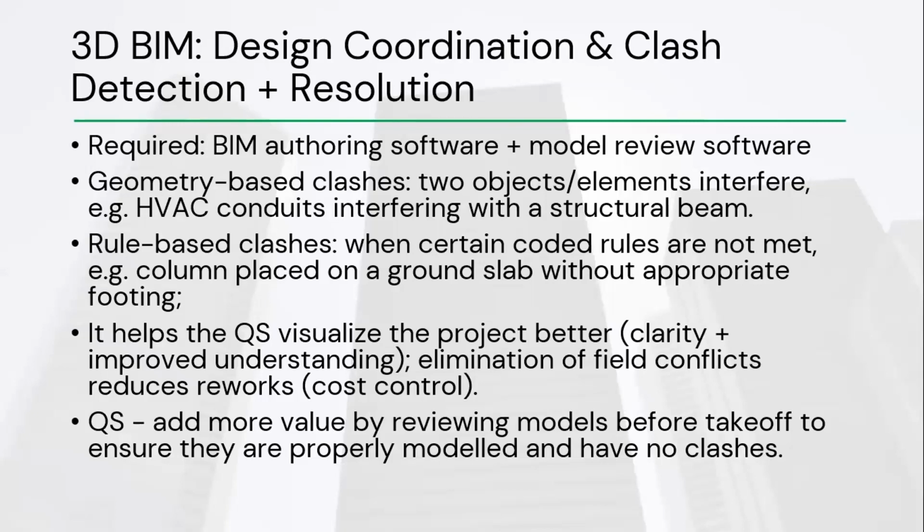Also, the roles of the QS now start broadening from the traditional roles to a role like design review. The QS would add more value to the project team by reviewing the model before takeoff to ensure that they are properly modeled and there are no clashes that are part of the project. So we are going to have fewer change orders, less cost overruns, and improved site productivity at the end of it all when we use 3D BIM appropriately.